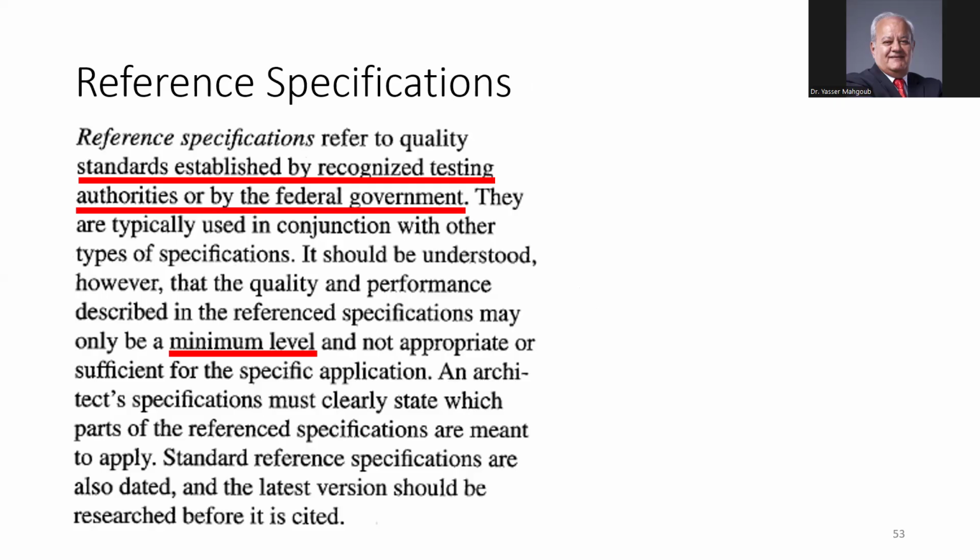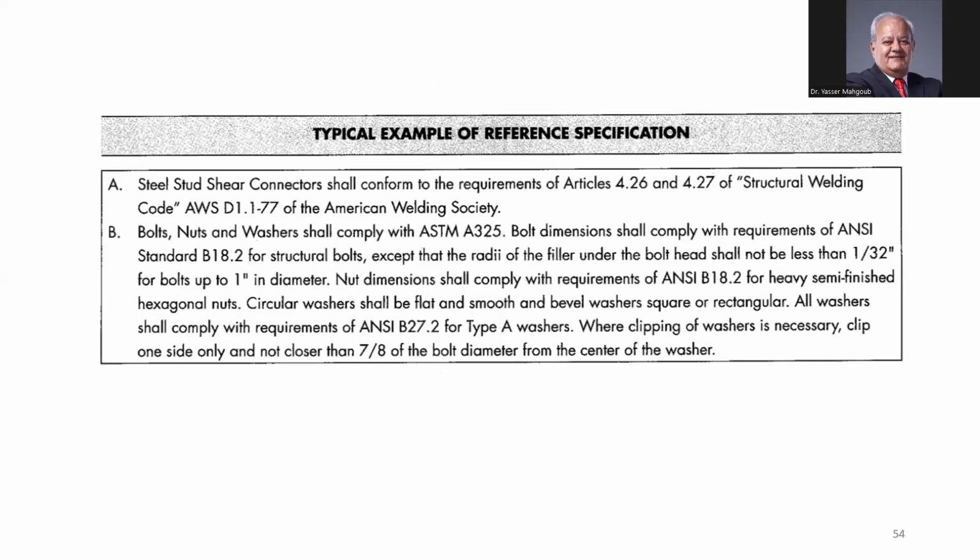Reference specs are specs that refer to quality standards established by recognized testing authorities or the federal government. So as I said, you say that all specs must refer to the Egyptian specification instead of writing your own specs.